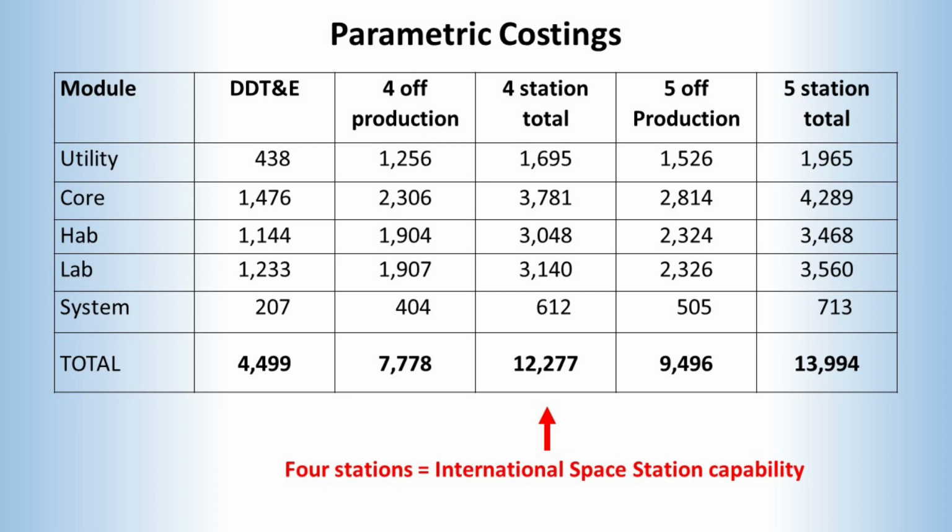It's difficult to establish what the equivalent ISS cost was historically because it was so complex and spread across so many countries. But the equivalent single station in theoretical terms, well then we're looking at roughly 15 to 18 billion for development and 5 billion for production, a total of over 20 billion. So we're looking here at almost halving the acquisition costs.